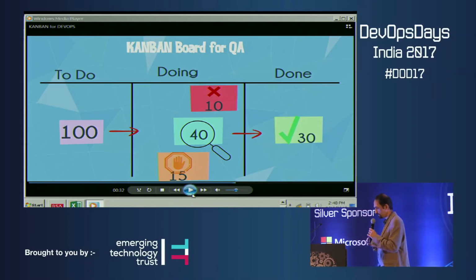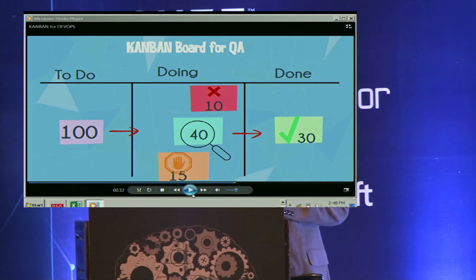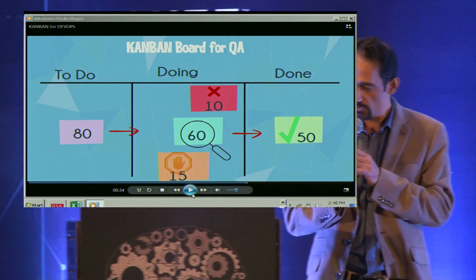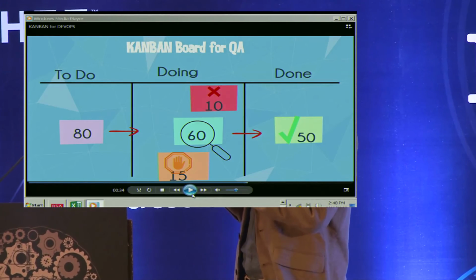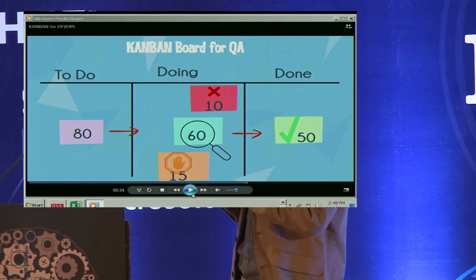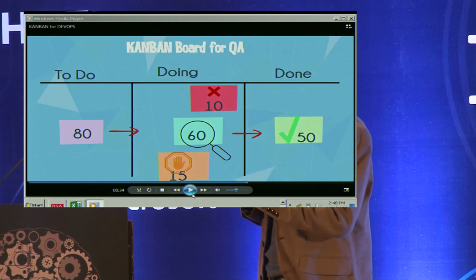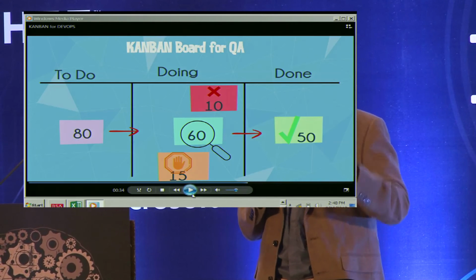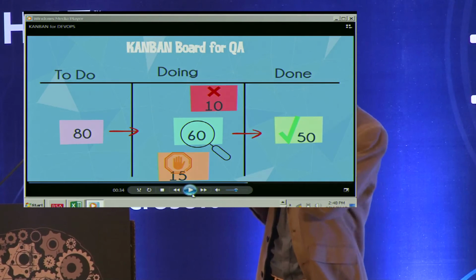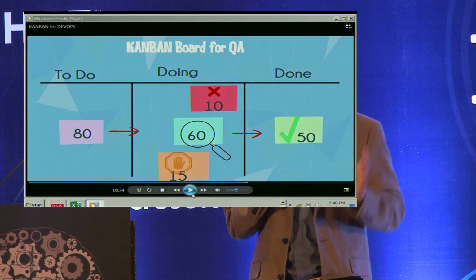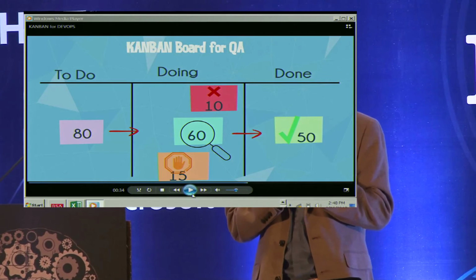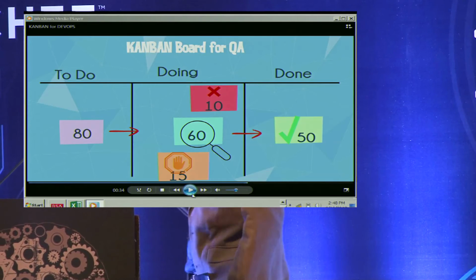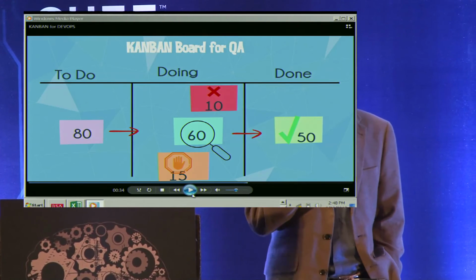In that case, we have to see what we are working on and how we can progress. For example, we have completed 20, so then we moved 20 more tests into the doing stage. There we are keeping our inventory level in control. That is how we were doing it for production systems. Here we are updating the number. We are not moving the sticky notes or the work, but we are moving the number. This is one of the innovations, or small improvements, that we have done.